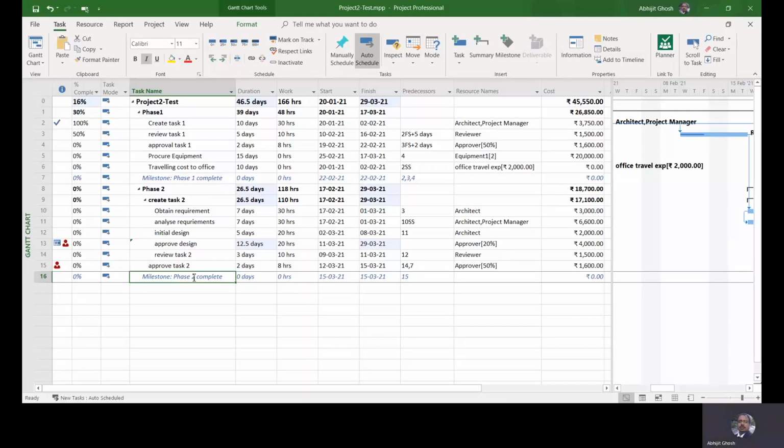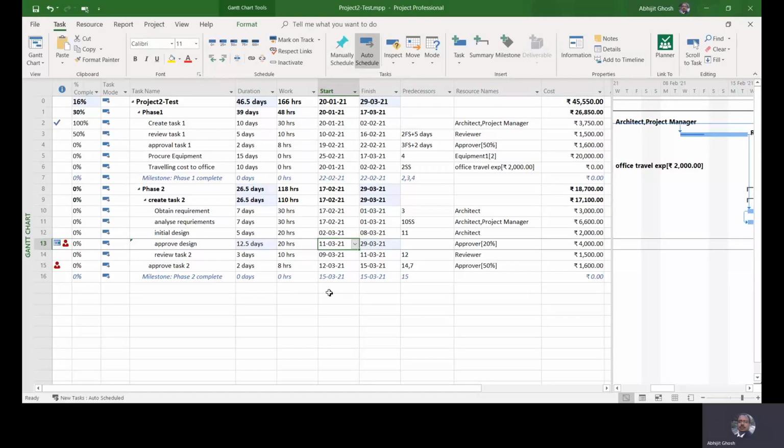Another thing: even if I complete it on the 8th, I would begin on the 11th. Don't force it on the 11th. Rather, we would try something else, because by forcing it and keeping these predecessors out, you have lost the dependency on this task. What happens if this task is delayed or you do it earlier? Until you get this task done, you can't come down to the latter tasks. So you have no way to understand what has happened.